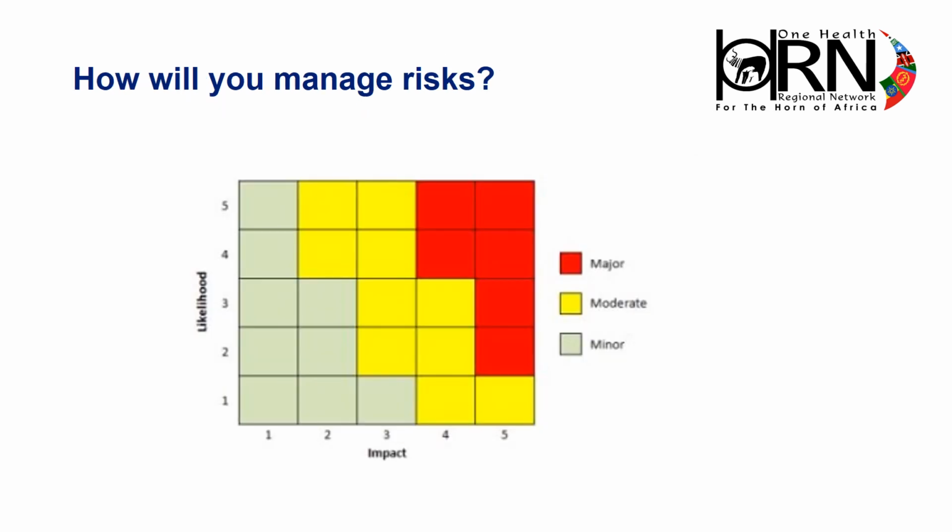To support the smooth running of a project and minimise the chance of disruption, it is good practice to analyse and manage potential risks. This involves all members of the project team having the opportunity to suggest any factors that might be a potential threat to the project. It works best when team members can all contribute to this exercise to ensure many different perspectives are taken into account. Once potential risks are identified, it is good practice to decide and document how you would mitigate against each of the risks. This enables you to take steps to minimise the risk immediately if possible, or respond swiftly if an identified risk does materialise.